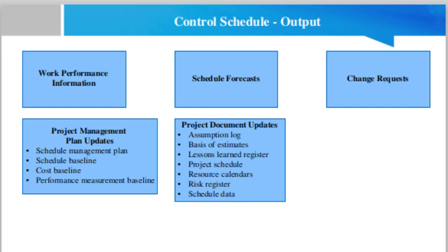Schedule data. New project schedule network diagrams may be developed to display approved remaining durations and approved modifications to the schedule. In some cases, project schedule delays can be so severe that a new target schedule with forecasted start and finish dates is needed to provide realistic data for directing the work, measuring performance, and measuring progress.